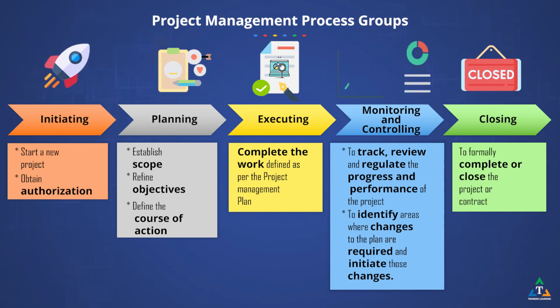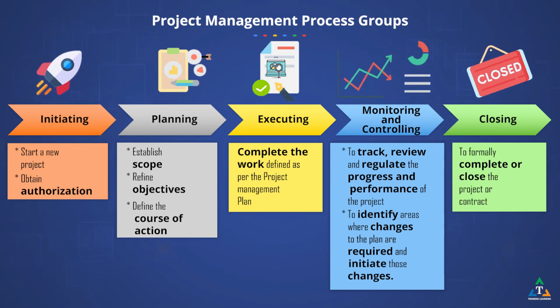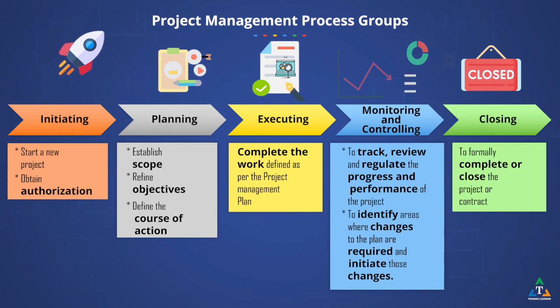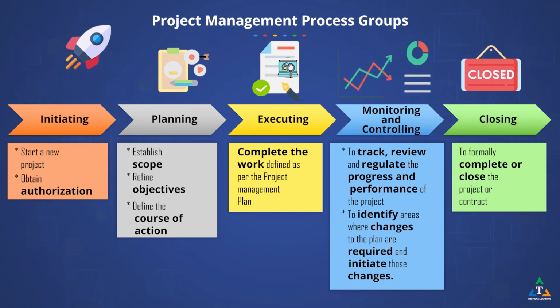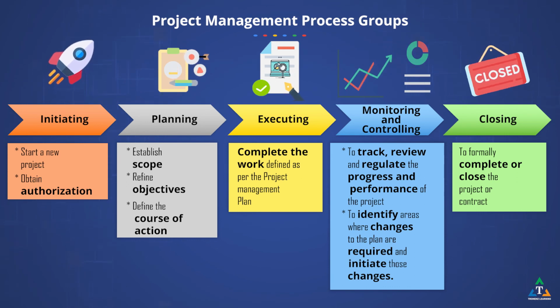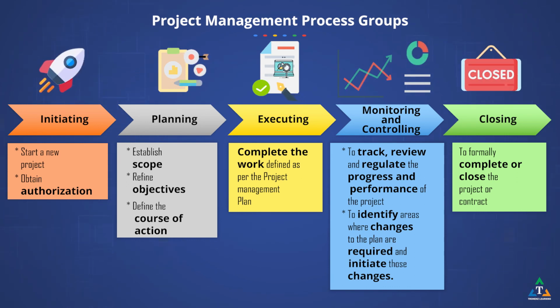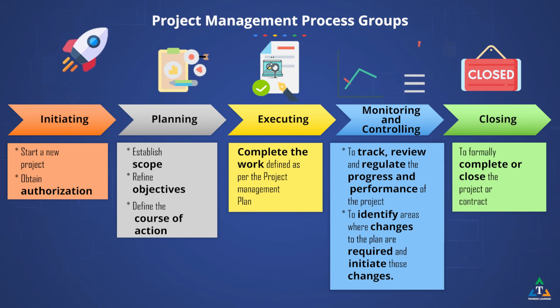The initiating process occurs only once during a project, or phase within the project, at the beginning, whereas the closing process occurs only once towards the end. However, planning processes, executing processes, and monitoring and controlling processes are repeated several times during the project.